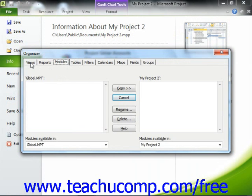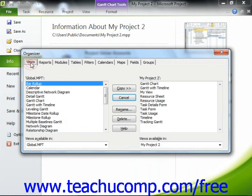First, click on the name of the tab that contains the type of object that you wish to transfer from one project file to another. Next, use the left Object Name Available In dropdown to select the name of the project file that contains the specific object that you want to export into another opened project file.